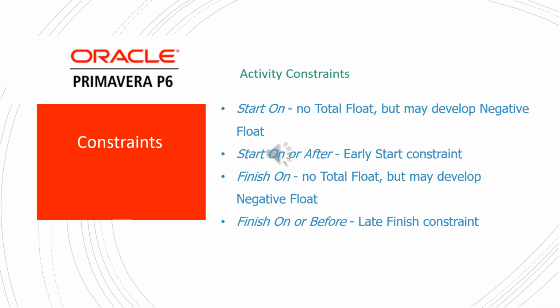Constraints. Start activity constraints. Start on: no total float but may develop negative float. Start on or after: early start constraint. Finish on: no total float but may develop negative float. Finish on or before: late finish constraint.